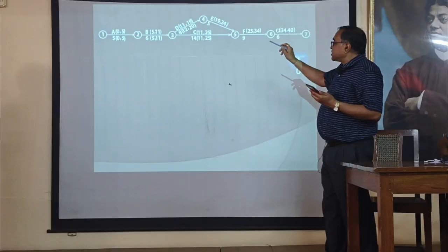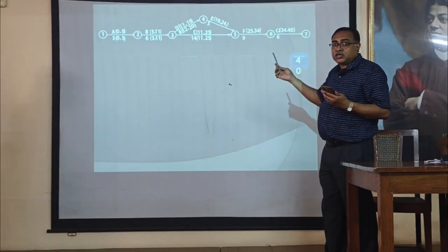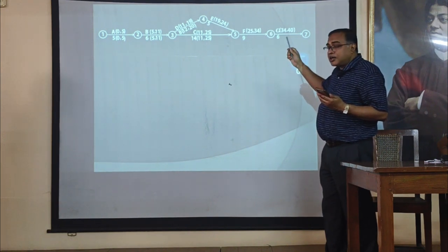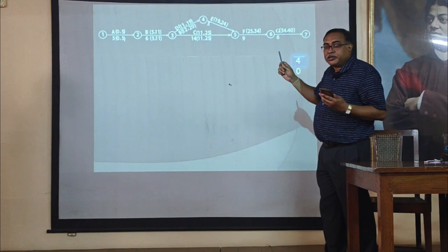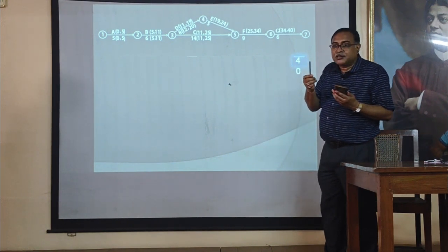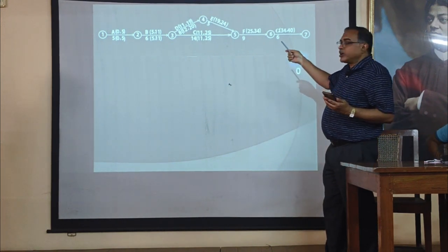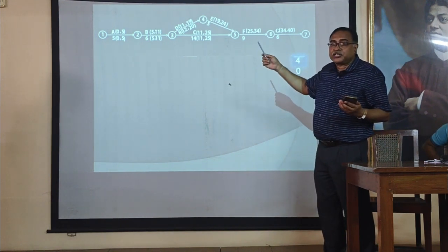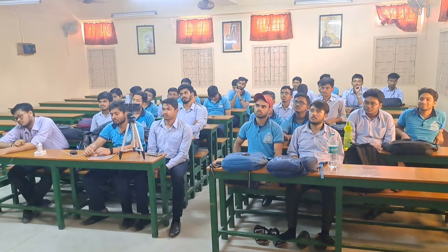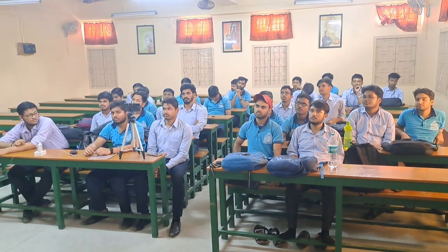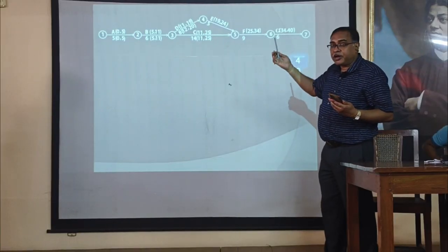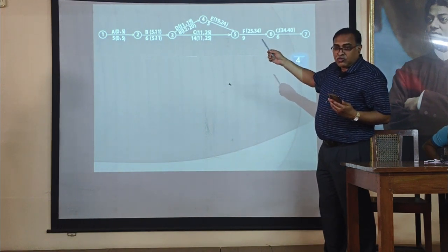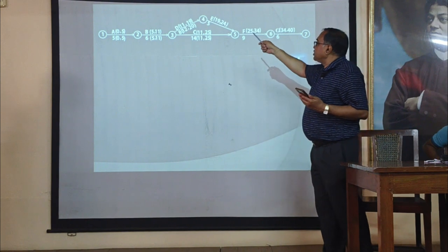Okay. Next, what is the duration of C activity? It is 14. So early finish time of C activity should be 11 plus 14, so 25. Similarly, what is the early finish time of D activity? 11 plus 8, what is the value? 19. This is given in our network.